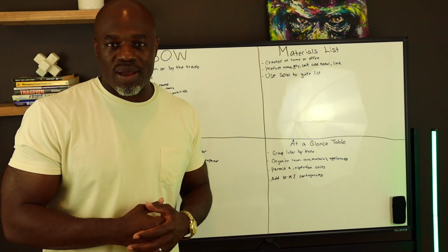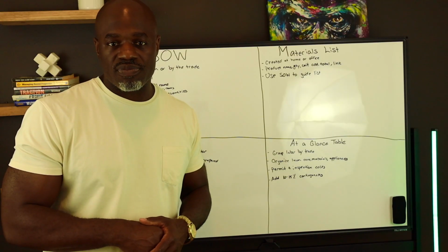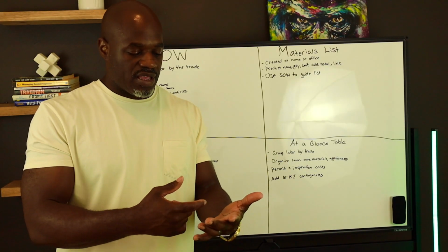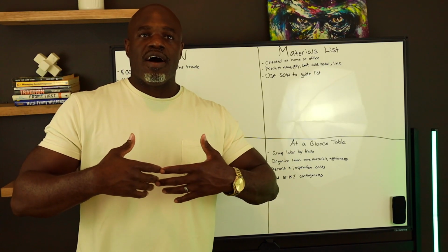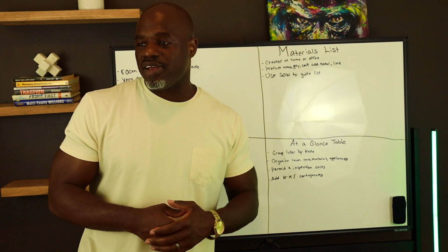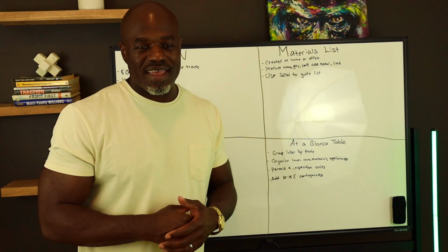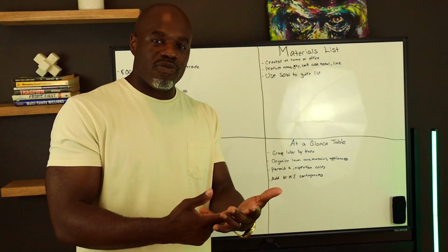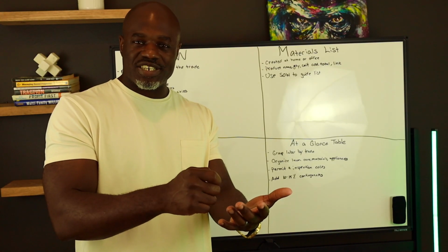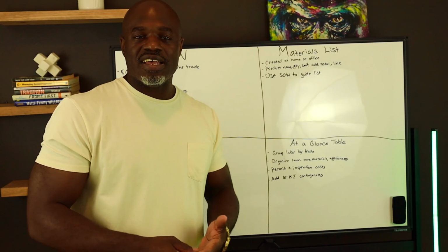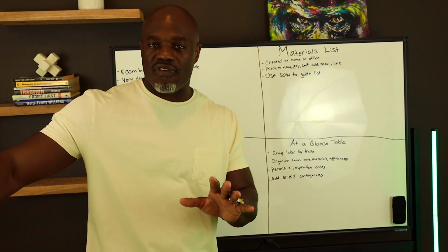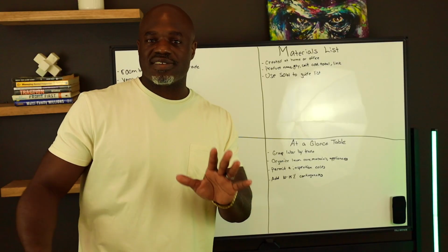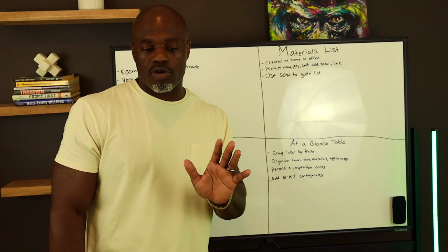Hey, I stop by my project at least 4 times a week. Whenever I stop by, I love to just go through the actual scope of work, right? Whenever you visit a property, your contractor may say, oh yeah, we've already done this and we've done that. But then when you go through the actual scope of work, there are items that you really can't check off yet because they aren't done. So whenever you have a project, your contractor is going to find a bunch of other things going on in the house that maybe you forgot to even put on the scope of work.